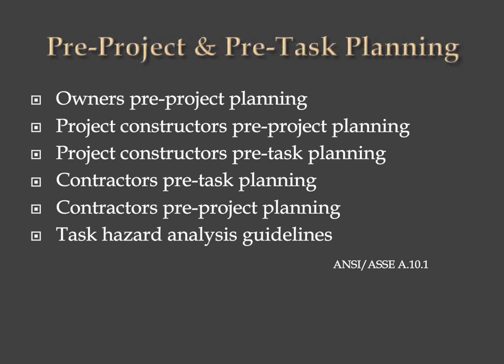What I mean by coordinated, let me give you an example. You've got a crane on the job site. You have numerous different contractors on the job site doing different things. Whoever is operating that crane is going to be picking up material and moving it around. One of the things that he has to do is to make sure that those plans take into consideration what they're going to move, when they're going to move it, and what the path of that is going to be, so that it doesn't go over top of other employees that are working in that particular area. That's just one example. You can see from that if you do your job right, the plan comes out, you're not going to have one contractor interfering with another.